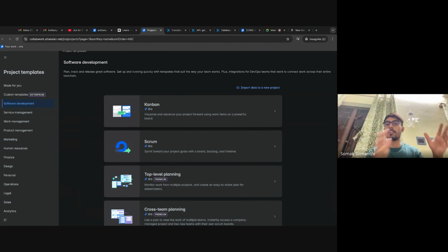We have an estimation pipeline for that first, the way we estimate how much time we are going to take and track that. And then if we fall back on something, that goes to the backlog, and then we have a timeline that, okay, from this Monday to next Monday, we have this thing done, and these things weren't done, so next time we'll have this as priority.